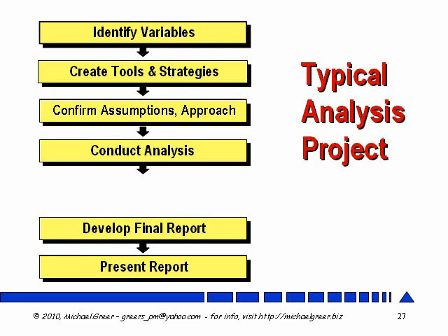I go back to the client and confirm my assumptions and my approach and get their feedback and their cautions. And they'll say something like, well, you don't want to take this questionnaire to this customer, and you certainly don't want to talk to the people in Detroit about this or that topic, and so forth. So they adjust the way I use them. Now I'm ready to go out and conduct my analysis, because what I've done here is build in the checks and balances, the control points through the phases that allow the project deliverables to evolve gradually and in conjunction with